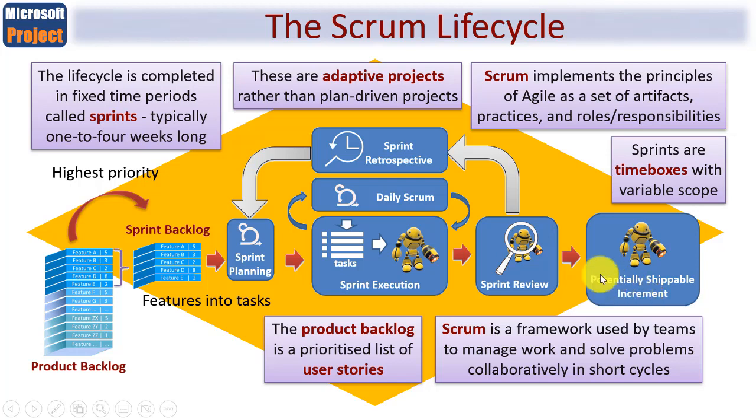After the sprint review, again nearing the end of the sprint, there'll be something called a sprint retrospective, which, as the name suggests, we look back at what we've achieved and seek out anything that can be improved, whether it's at a process level or human or what have you. More of that later. And of course, as a result of the sprint retrospective, it may well be that changes to the sprint backlog are suggested, then these would be addressed for when the next sprint is planned.